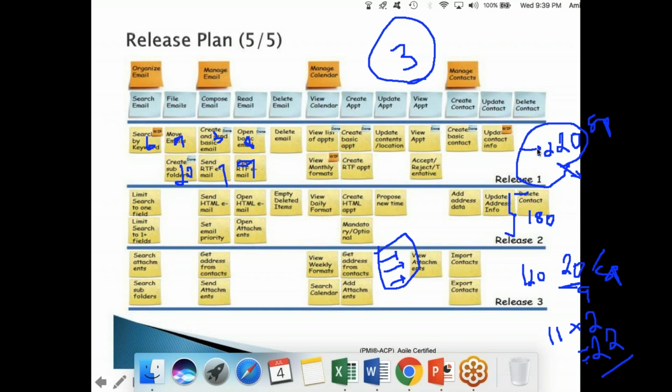Okay. So now let me go back to the questions here. Estimation takes place before release planning and not during sprint planning. See, Ashwin, I told you story point estimation will happen during release planning. And hour-level estimation will be done at sprint planning. So estimations will happen at both levels. At the release level, you just give some number to it based on the complexity, but you do a detailed estimation in hours and minutes during sprint planning.